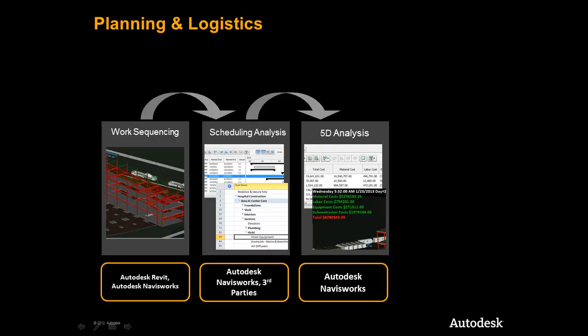Finally, we will add cost information to the schedule and begin to do a 5D analysis and determine the cash flow for our project.